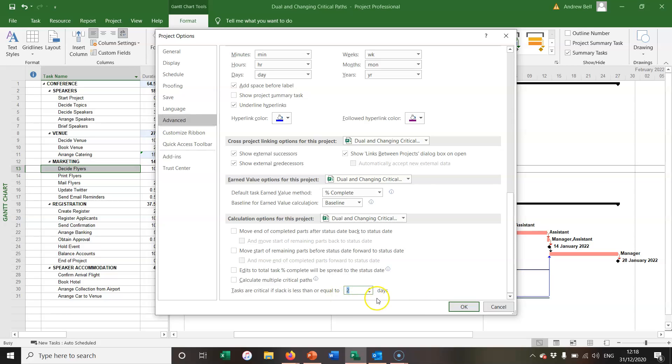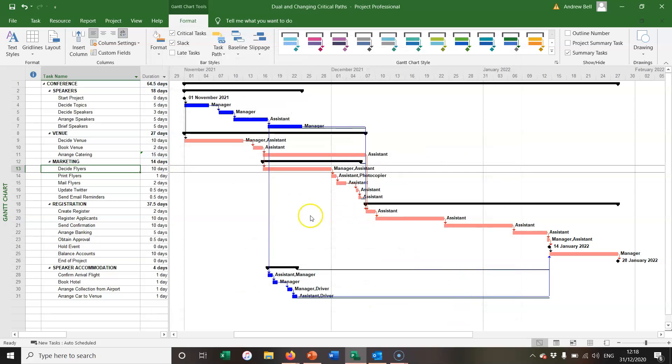I could say two days, click OK, and now anything within two days of becoming critical is shown as critical. Now this might be a good reason for optimizing the whole project schedule, or certainly those things that are very nearly critical, so if the critical path changes then you're working on a completely optimized schedule.